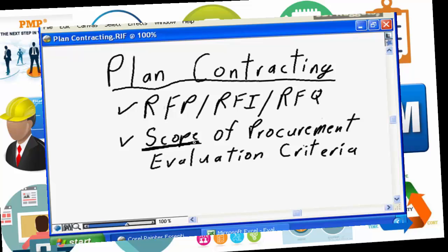It could be argued by some that the scope definition for the procurement processes needs to be more intense, more well-defined than the actual scope itself, and that's simply because you're entering into binding legal contracts as part of the procurement process, and therefore it's important that the scope definition is so well-defined, so ironclad, that there's no room for ambiguity, there's no room for interpretation in the contracting process, that it absolutely binds the seller to deliver exactly what you need for successful project delivery.